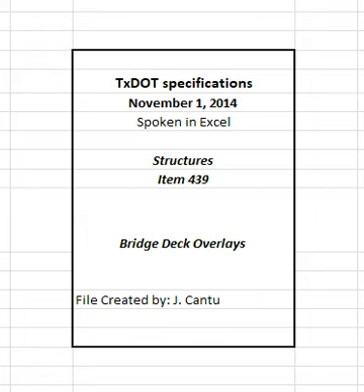Payment for multi-layer polymer concrete overlay is full compensation for surface preparation testing, presence of overlay system manufacturer's representative at initiation of the work and as requested, furnishing and applying crack sealant and multiple layer polymer concrete overlay courses, repairing damaged or marred overlay surfaces, and all materials, labor, tools, equipment, and incidentals. These prices are full compensation for materials, tools, equipment, labor, and incidentals.